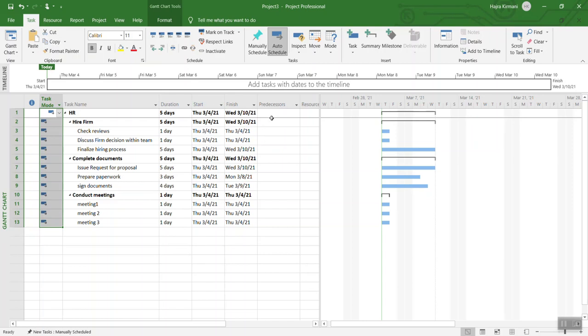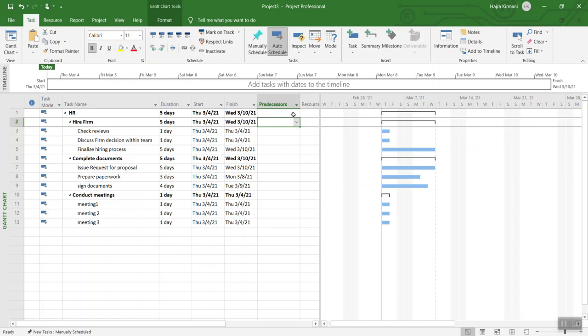Right now you have all these days because you already had duration. Now you have start and finish date for each task, but you do not have the predecessors. Predecessor is the dependency of one task on another, which means that you cannot perform two things in parallel because the first item has to be completed first before you move on to the next one.